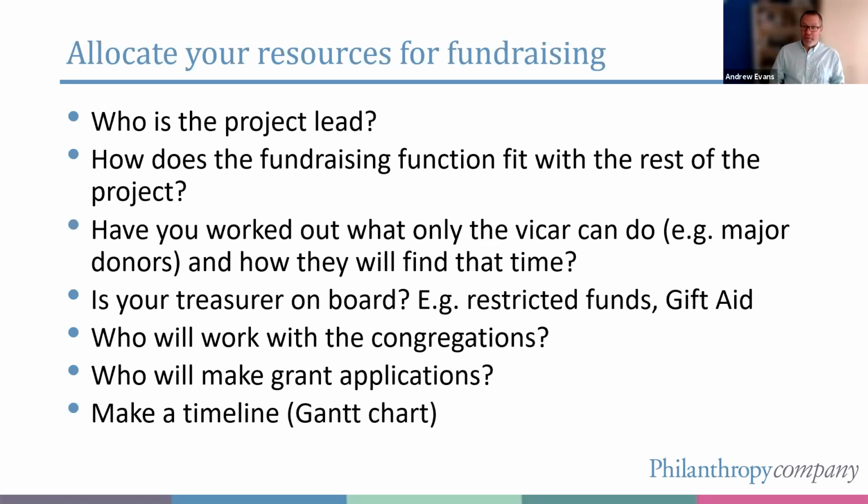If you're going to be making grant applications, I think for most of these projects you probably will be, who's actually going to do that? It's quite a time-consuming job. If you're going to do, let's say, 20 grant applications, your first one's probably going to take a couple of weeks of full-time work. After that, they do get much quicker because lots of the materials are the same.